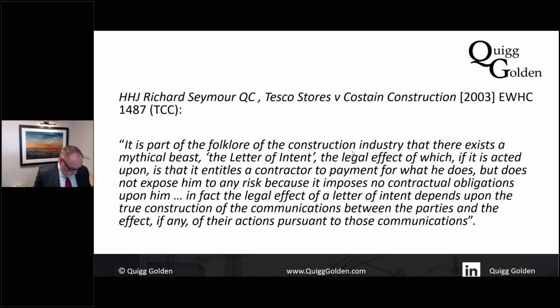And if we look at Judge Seymour here in Tesco's, it's part of the folklore, I like that, folklore of the construction industry that there exists a mythical beast, the letter of intent, the legal effect of which, if it is acted upon, is that it entitles the contractor to payment for what he does, but does not expose him to any risk because it imposes no contractual obligation on him, i.e. the contractor can decide to do some work authorised under this letter of intent, or decide not to do so.